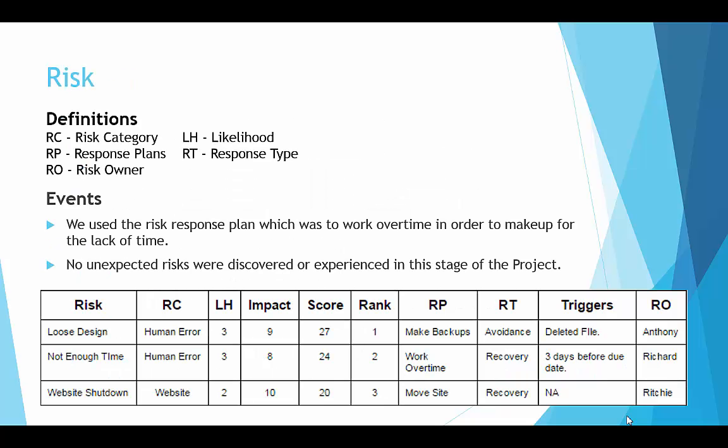And then the risks that we ended up having, there didn't really end up being any risks. We did have to use one of our risk response plans, which was not enough time, and it triggered 3 days before this assignment was due, and so we kicked it into high gear, and instead of finishing it in 3 days, we actually finished it that day, so we were 2 days early. Besides that, we didn't have any other risks, and no other risks popped up that were unexpected, so that was great, and that helped us finish this project on time.